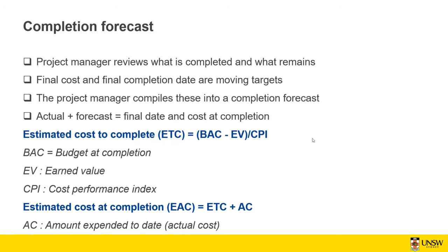This is just a way for you to get things on track. But if things just go as normal, you can say that the previous performance in terms of the earned value and actual cost is going to be at the same rates for the future work. Based on that, you can see by the time the project is completed how much you're going to be over budget, how much more you need to spend, and how much the delay of the project is going to be.